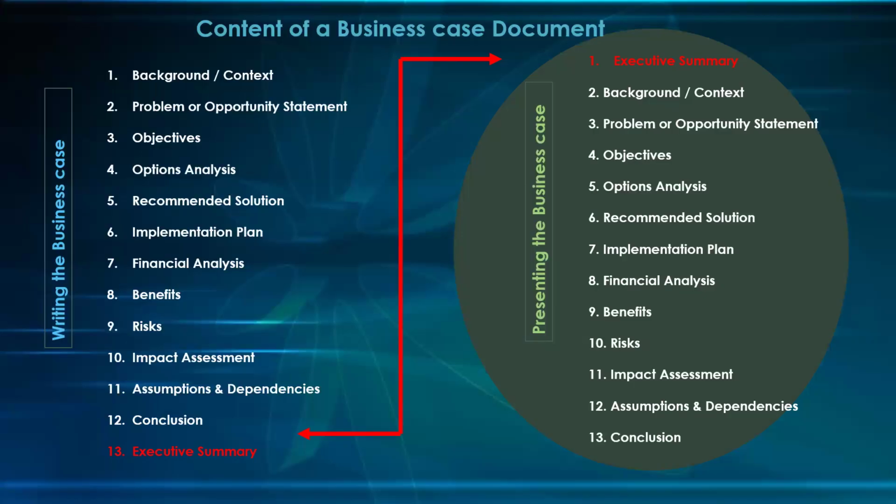So that you understand the dynamic, you then assign a risk to it. If it's low risk, you don't have to worry too much, and you don't have to involve the project board if you have that in place. But if it's high risk, then you know you need to inform management. That's why you do your impact assessment, to determine what level of involvement is needed.